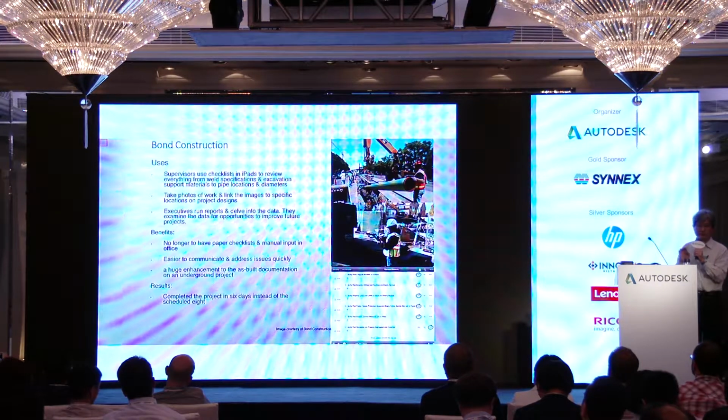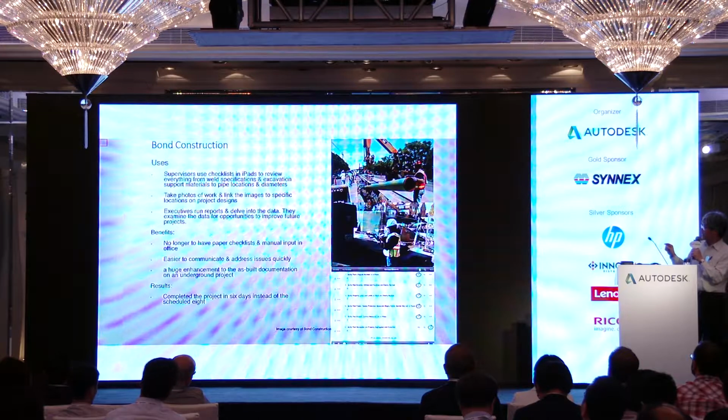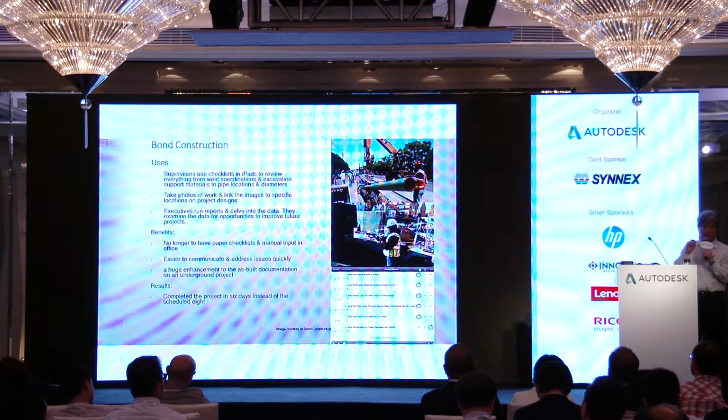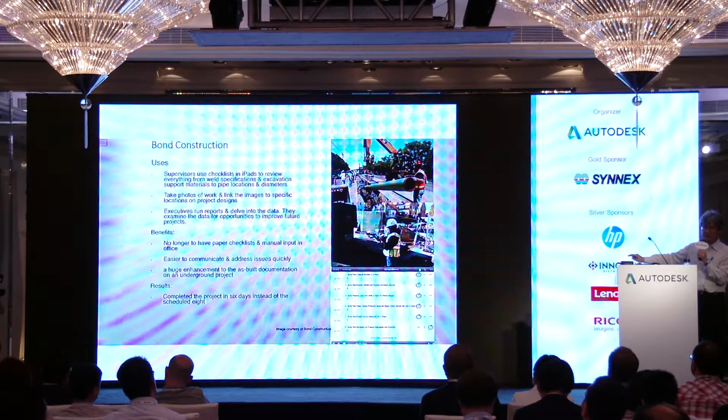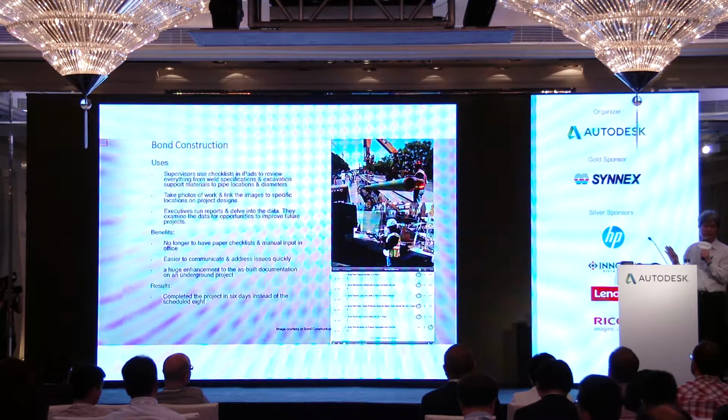All the welding specification and testing information are already in the iPad in the field, and so I think after each sequence, say trench excavation, they have to check the shoring system. Once this is passed, the inspector just clicks and does the checklist, says everything passed, and then the contractor knows, oh, okay, everything passed, including the test, so they can start the next step tomorrow.